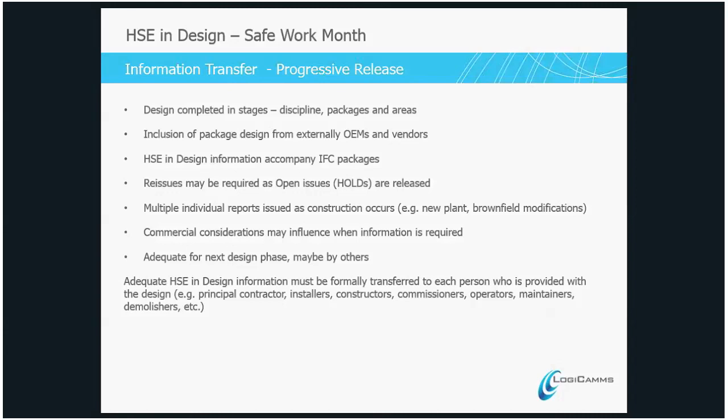So obviously if you're doing a study and the design's only been taken to a certain point, then the level of documentation from the HSE design aspect of that design will be at a much higher level. But it needs to be captured and included in the final study documentation so that it can go to the next company doing the next phase of the work, which hopefully will be us, but could be others.